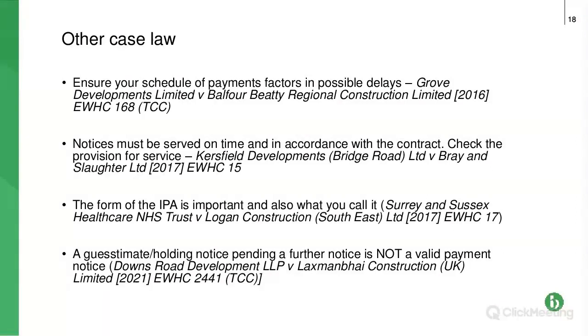Notices must be served on time in accordance with the contract. We've already dealt with this, but check the provision for service of notices. Third bullet point, the form of the interim payment application is important, and what you call it. We've already dealt with that, but be clear, use the same forms throughout. If you change them, just be super clear when you issue them. Just say, we've changed this format, but it still is an interim payment application, a payment notice, a pay less notice.